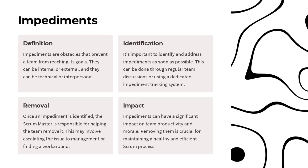Impediments are obstacles that prevent a team from reaching its goals. They can be internal or external, technical or interpersonal. It's important to identify and address impediments as soon as possible, through regular team discussions or a dedicated tracking system. The Scrum master is responsible for helping the team remove impediments, which may involve escalating issues to management or finding workarounds. Removing impediments is crucial for maintaining a healthy and efficient Scrum process, as they can have a significant impact on team productivity and morale.